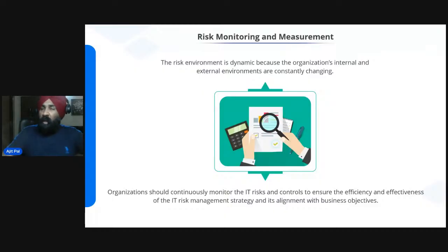Normally the complete exercise should be done once a year, but the review should be done quarterly. As an auditor, whenever I used to audit your risk management functions, I would check how frequently they are reviewing the risk assessment. Normally, organizations have risk forums. The business people and senior management should definitely be part of that.